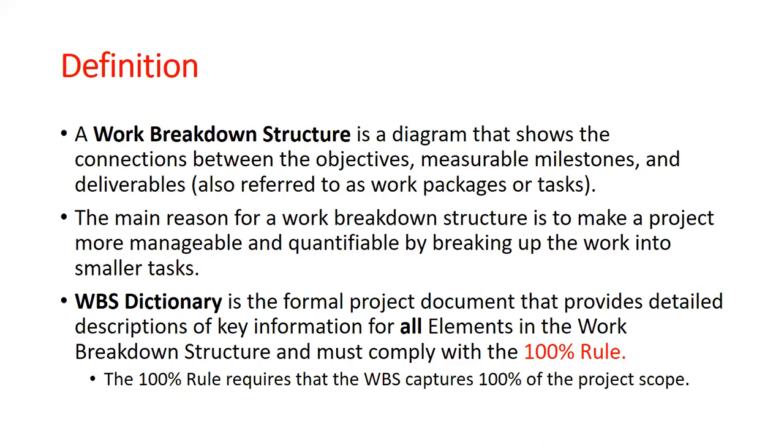A work breakdown structure is simply having the project scope title, then the project phases, then on each of the project phases you have tasks. If each of these tasks is bigger or not too easy to comprehend, it is the responsibility of the project manager to go further, breaking down those tasks into smaller bits, into lower levels that can easily be understood and then easily implemented. All right.